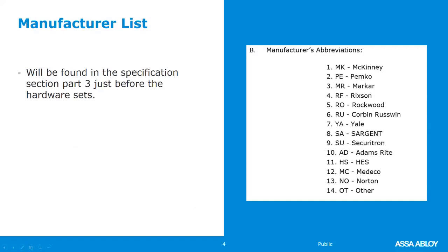I also want to note that the openings we will be reviewing are from a very large 18-story brand new construction hospital. It was a brand new key system, brand new hospital. They had an existing facility that they were going to reuse in different ways, but the owner, the architect, myself as a specification consultant, and my team spent over 250 hours of coordination meetings, liaison meetings with the staff from the hospital, talking about the flow of how they were going to be using the elevators and moving patients from one area to another.